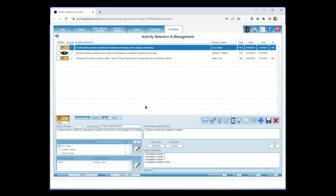Our first activity: create training content and materials for students and faculty on the dangers of smoking. Every activity has a performance metric — how do I know when I've successfully completed it? Once I've created the training content, I'm done, hence it's marked as 100%. When you mark anything 100%, it automatically sets the traffic light to gold. Every activity has a date range — beginning and ending date. By default, measurement is 0% to 100%. In this case, we completed Chapter 1 at 25%, Chapter 2 at 50%, Chapter 3 at 75%, and Chapter 4 at 100%, allowing you to move along that cycle.